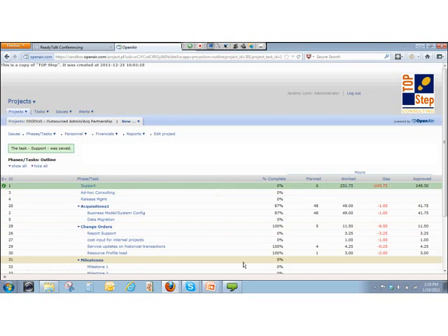If I was only doing planned hours, or approved over planned hours, this task would always be 100% complete, because I would have gone through the approved or planned hours very, very quickly. So you can see the percent complete is basically 0 because I have an estimation and remaining hours option going on.